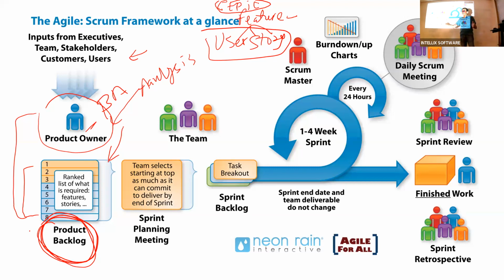But remember, in the Agile world, our sprint is generally 2 to 3 weeks. We have to deliver something to the business over 2 to 3 weeks. So let's assume our sprint is a 2-week sprint. Here it says 1 to 4 weeks, but let's just put it 2 weeks. A sprint typically starts from Monday to the next Friday, not one Friday, the second Friday. That's a 2-week sprint. Within 2 weeks, you have to complete all these things. So you have the requirement here upfront, but then what other activities are you doing?